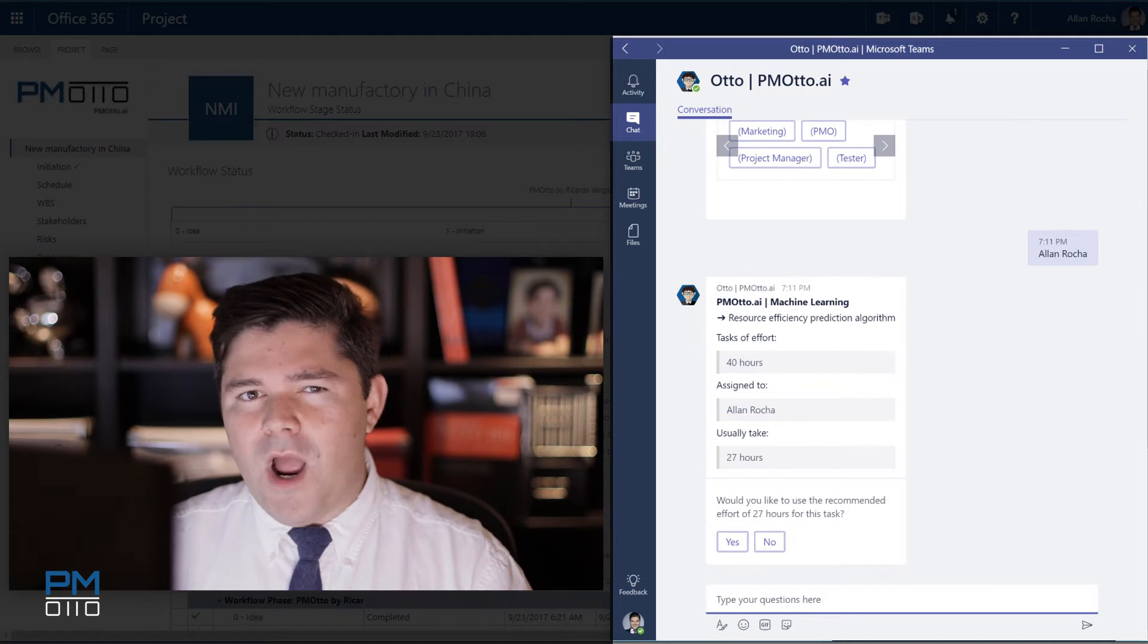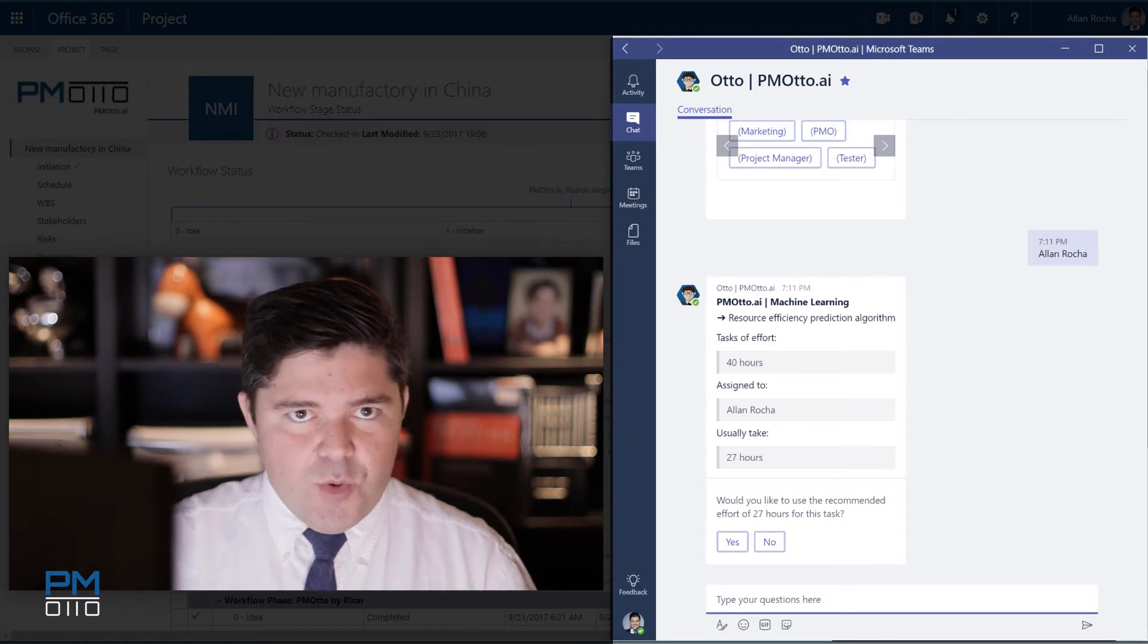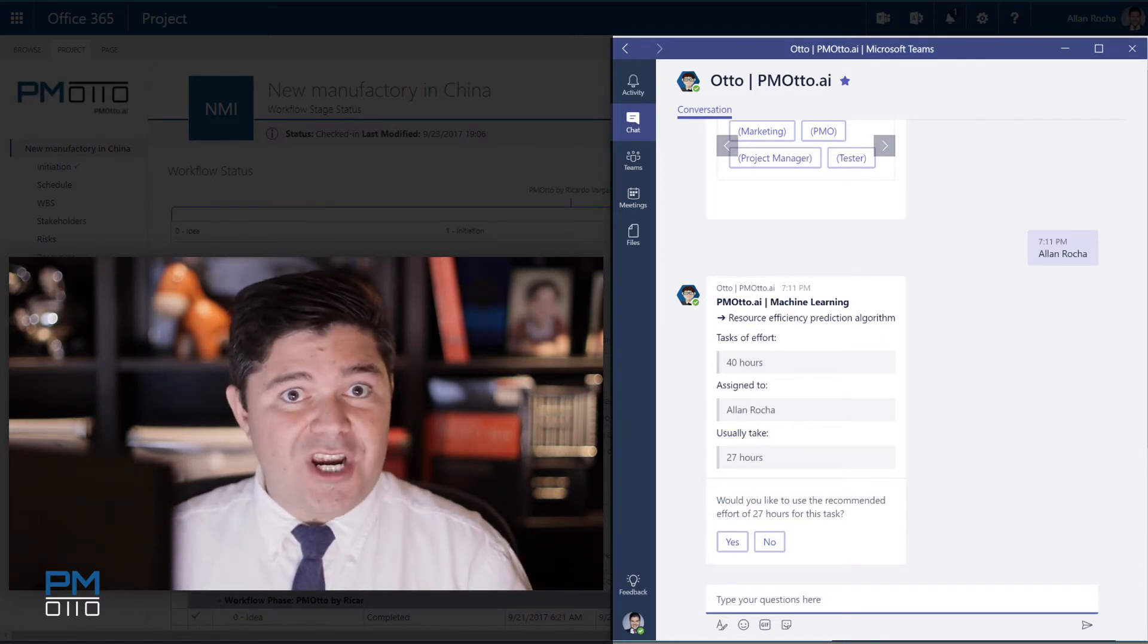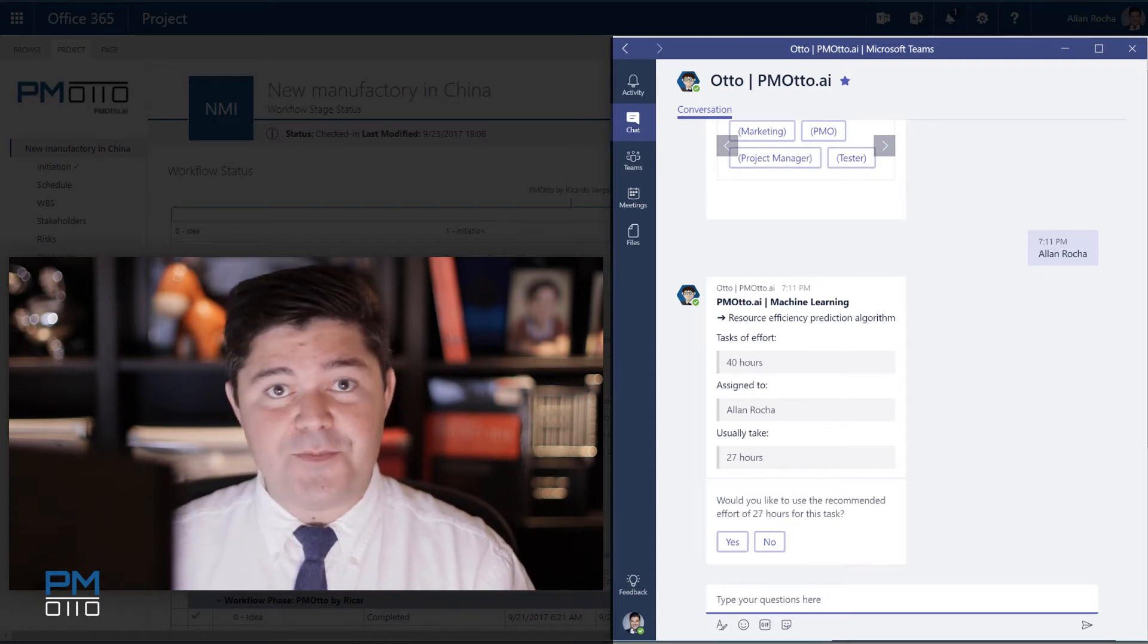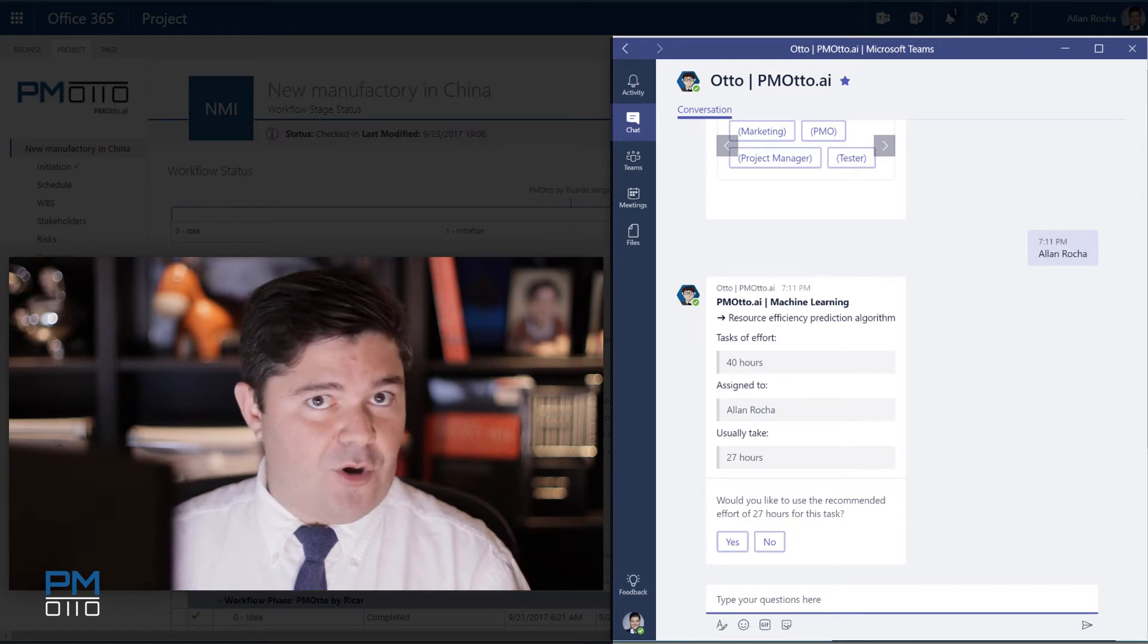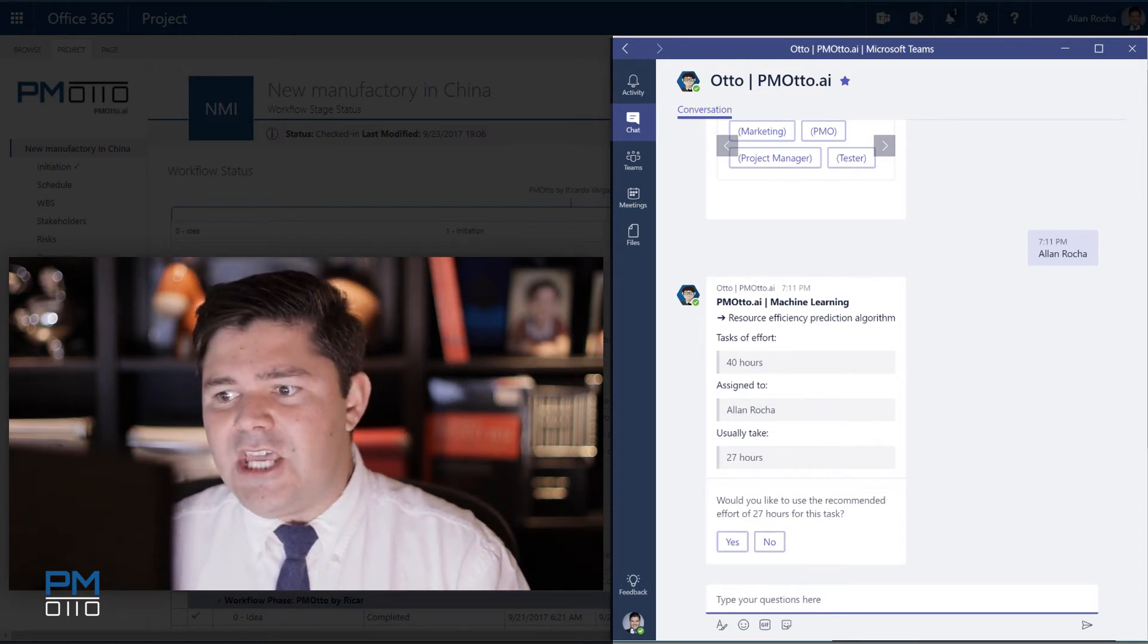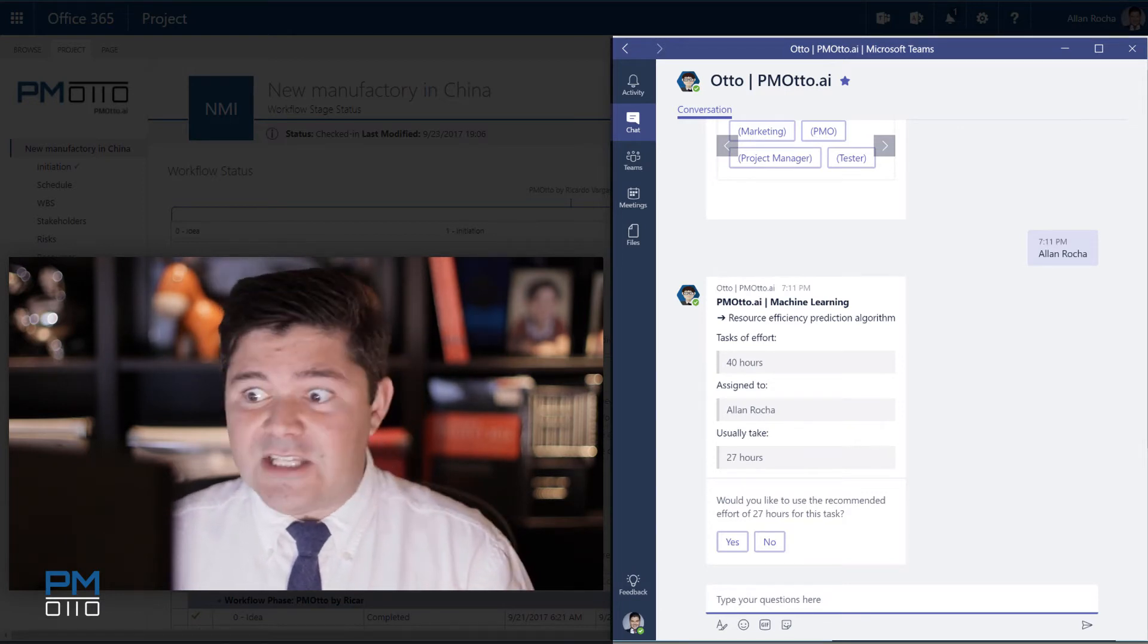One more time, PMOtto Machine Learning is now looking at the data, the task you have created, combined it with the resource which are now assigned to this task. And he's running the resource efficiency prediction algorithm to tell me that in tasks of effort of 40 hours, assigned to Alan, usually takes 27 hours. That's really amazing.